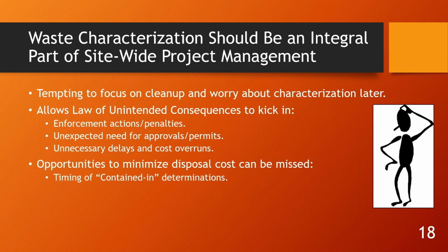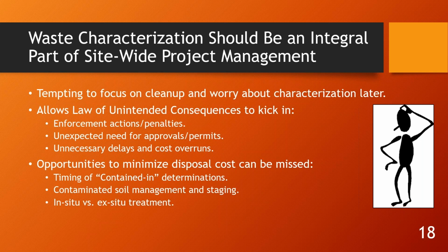The timing of these determinations can be important. And if you need a contained-out determination from the state, you need to allow for the time to get that determination, and your need to store and stage those piles needs to meet those time frames. In situ versus ex situ treatment, different regulatory requirements here.